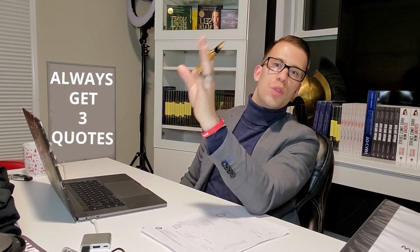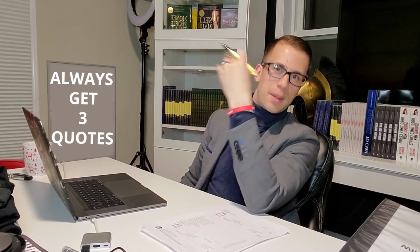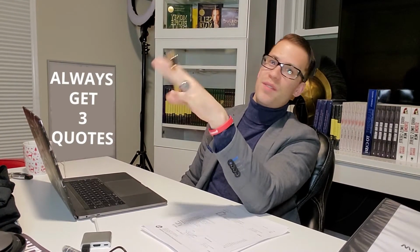So he knows that, and I told him I always get 3 quotes, always. So just so he's super clear, he's not like, oh, maybe I'm the only show in town here and I can just up the price. He knows I always get the things. He knows that I'm doing more volume.